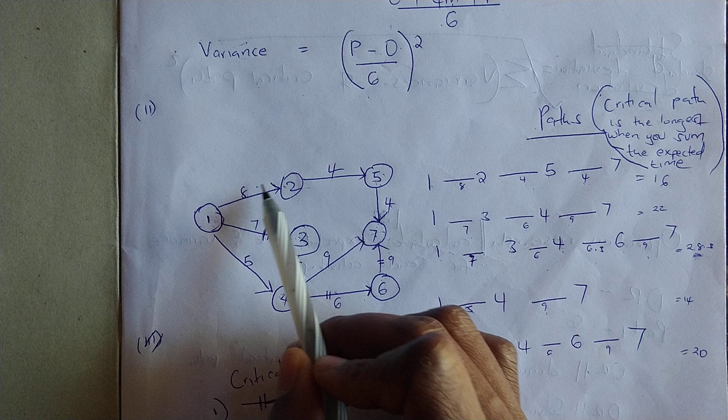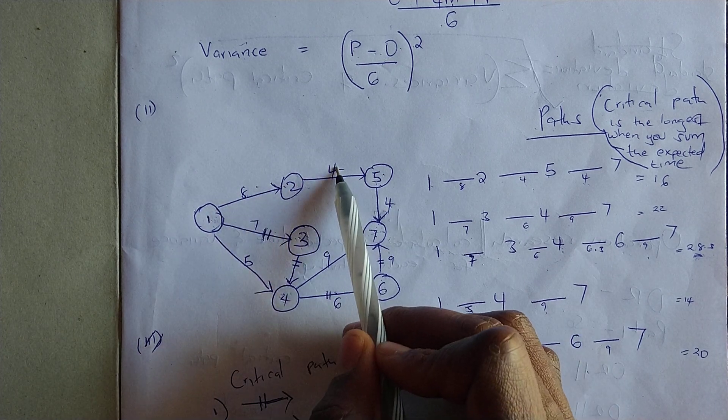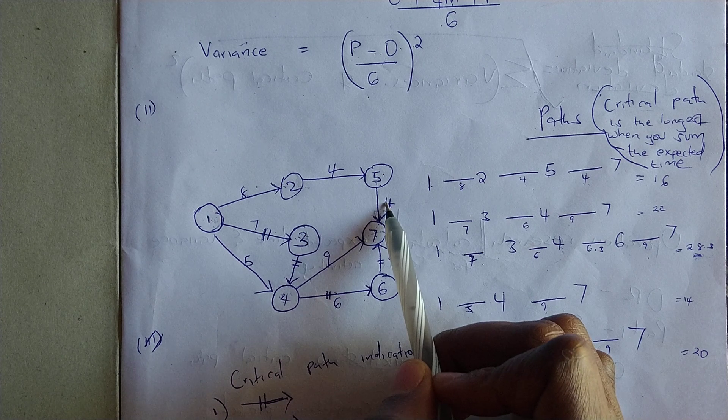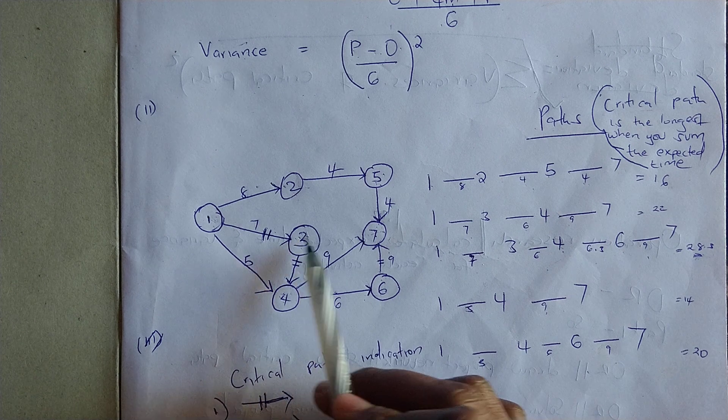How do you sum it? We'll use the expected time. For example, this path: one plus eight plus four plus four. It will give you a total of 16.